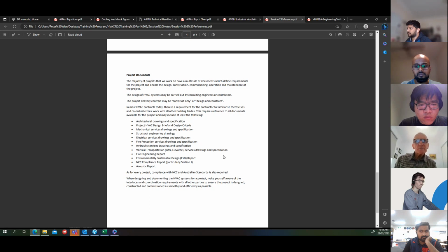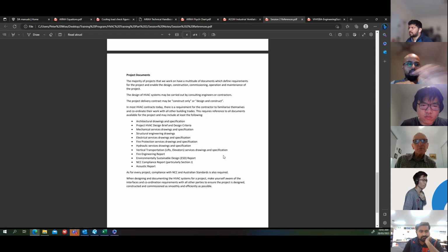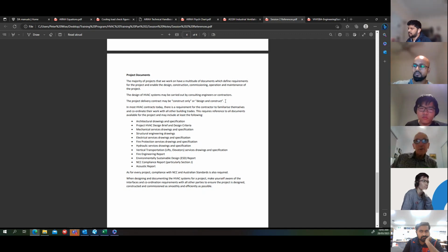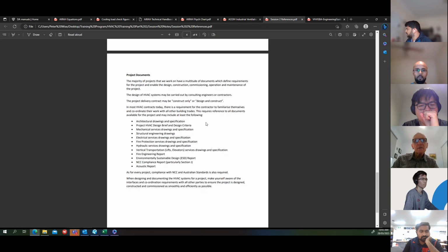There are some checks to be done, obviously, but basically you're not redesigning or trying to bring in some value management to the project. You just put in what's been asked. Design and construct is where it may be designed by somebody else, but a contractor has the responsibility of the design and the construction. So that gives a bit more scope to the contractors to change things if they see fit and if there are benefits for the project.